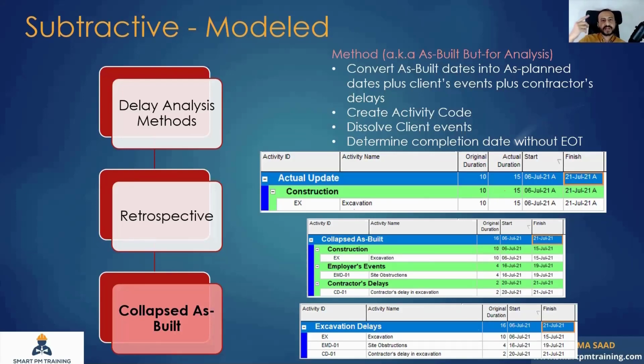But it's very hard to track, like if you have all these activities, I have to go through all construction activities and find the successor. I go back and forth to all different WBS. So it's very hard to review. So the third step is to create an activity code. Each activity code represents the employer's risk event or the delay event.